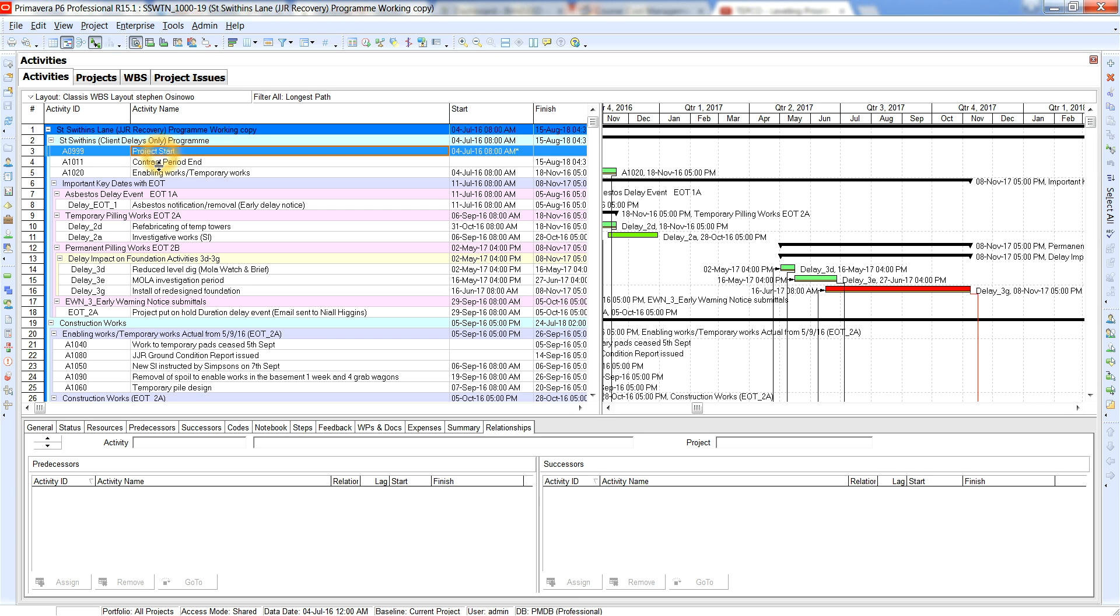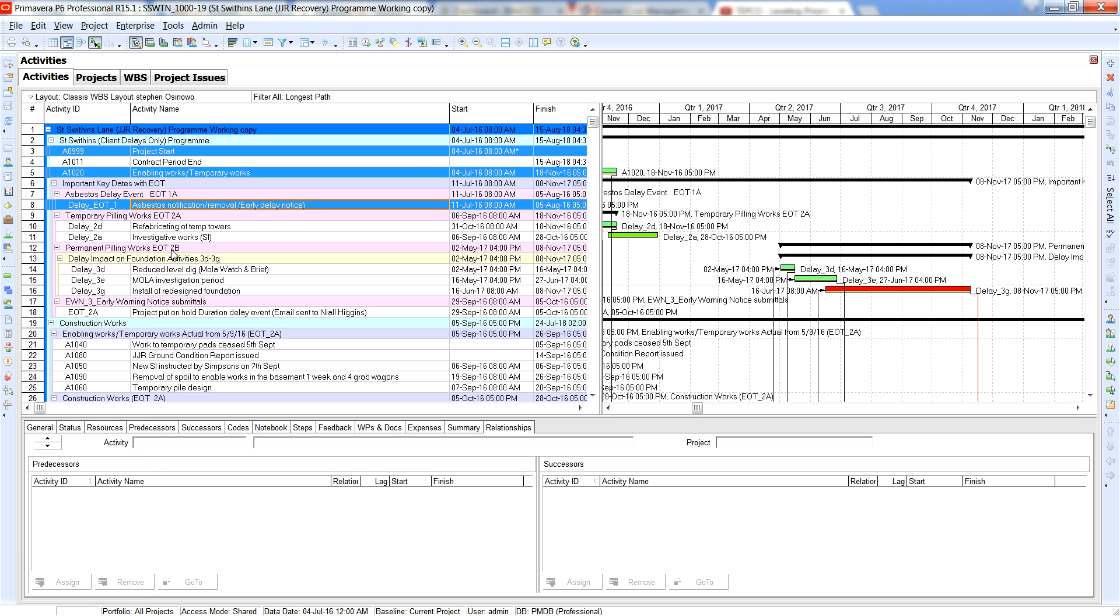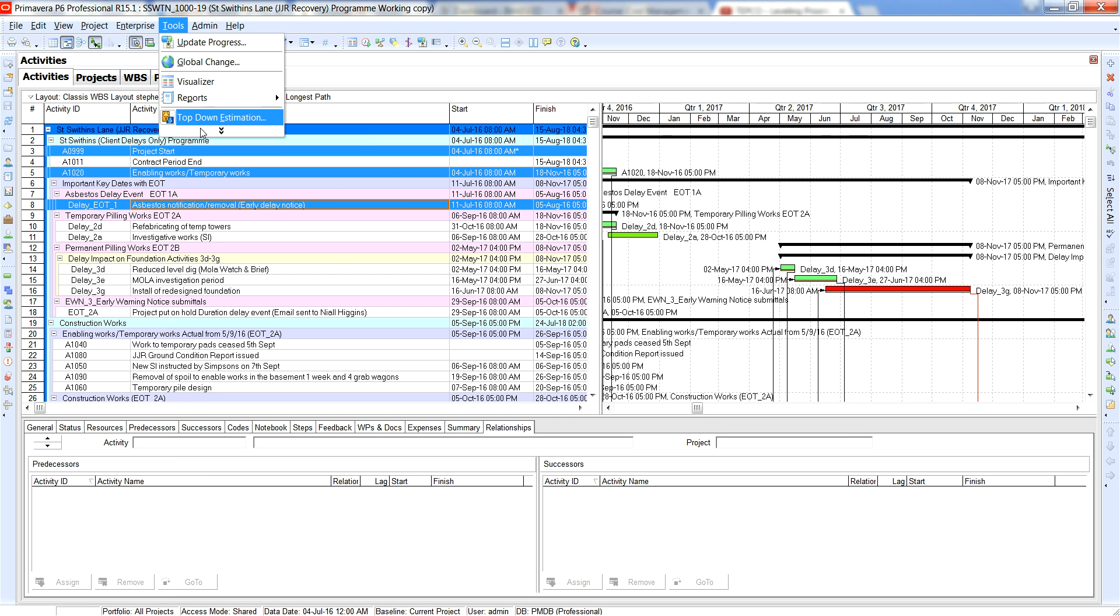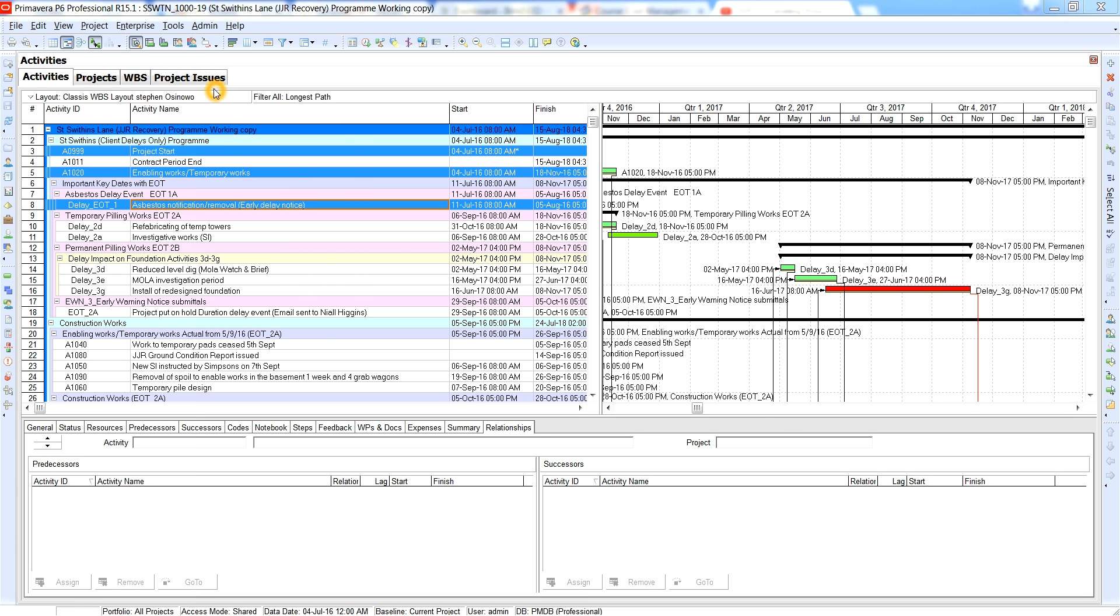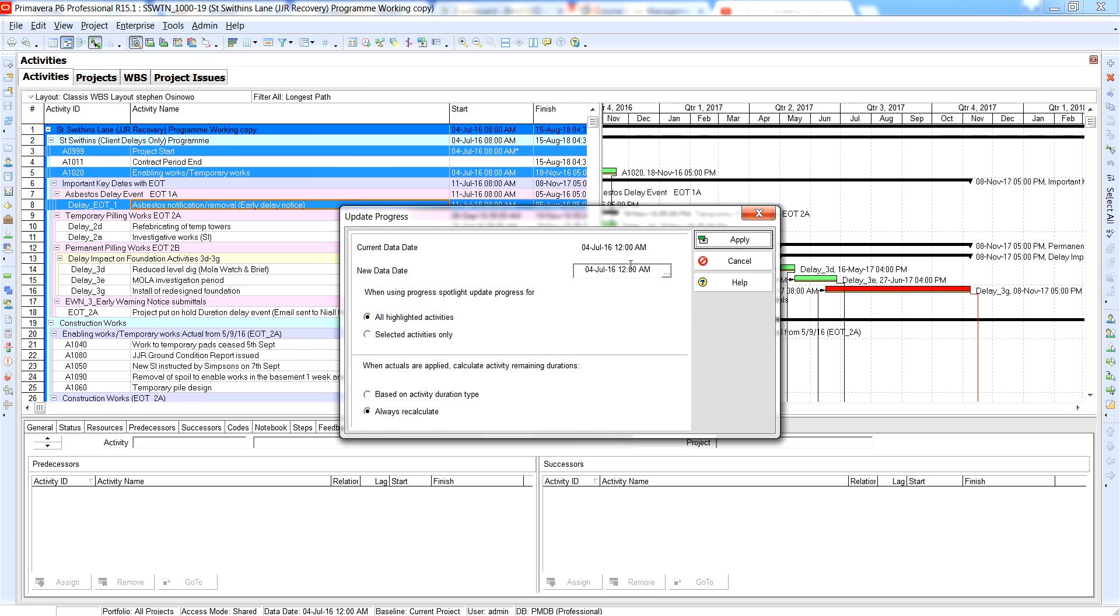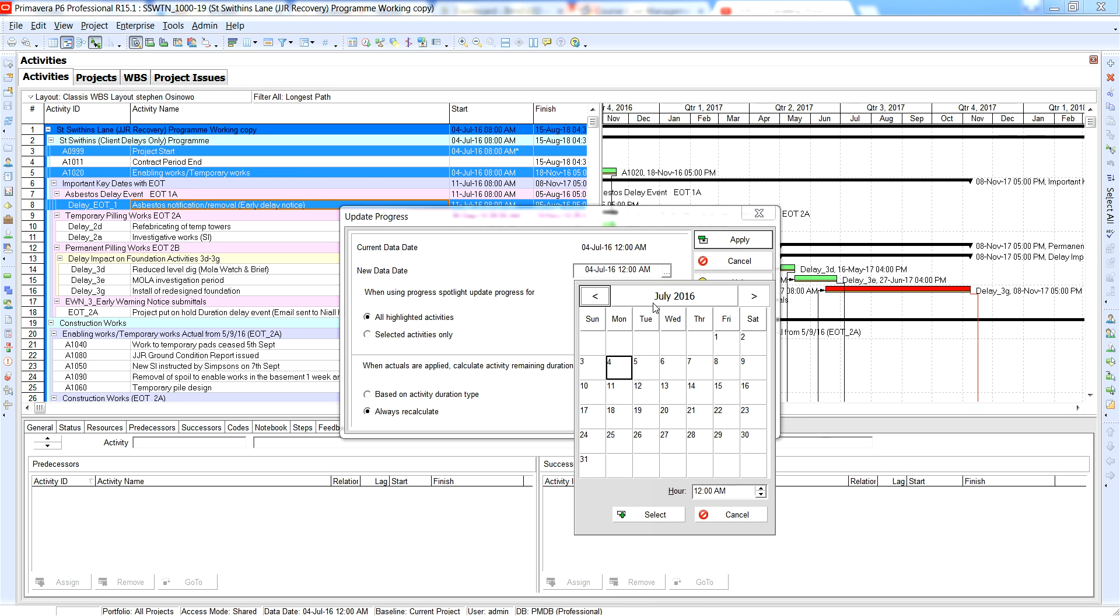Go on to project start, go into enabling works, and I look at the data date here. This is the 5th of August 16th and that's the 18th of November, so I'll progress the data date to the 5th of August. Update progress data date I'll put it as the 5th of August.